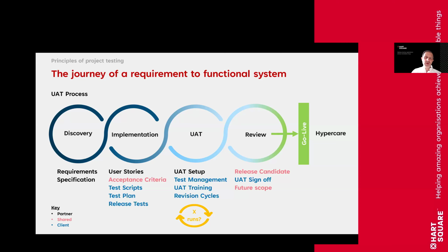I think what's really important here is I've illustrated a number of runs in UAT, and I think this is something I'd really encourage all of you to do as a key takeaway. At the point that you're agreeing your project, even if you can ask this question early on in the procurement cycle, how many test runs is the technology partner planning on doing in UAT? And what is their commitment to addressing any of those bugs that are identified in UAT.